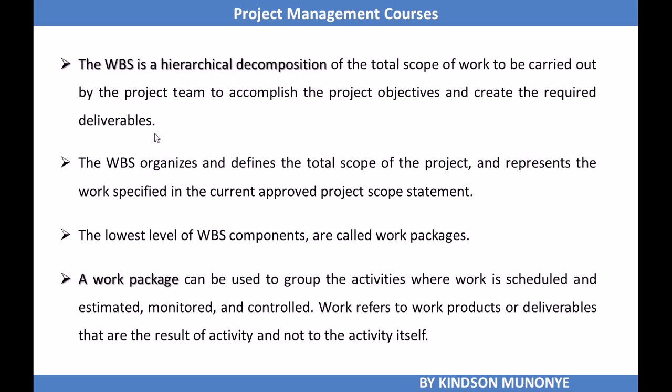A work package can be used to group the activities where work is scheduled and estimated, monitored and controlled. So the breaking down of this component to this lower level helps in estimation, and the work refers to work products or deliverables that are the result of activities and not the activity itself.